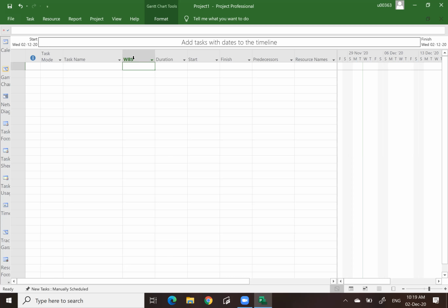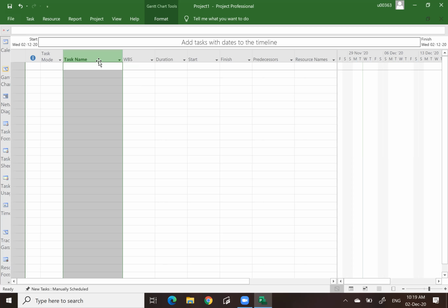See, the WBS we do not insert according to what we learn in class. We need to organize, because when you insert the task name, you put the list in the task name A, B, C, D, etc. So it is just a long list, and the computer does not know how to arrange it according to what the WBS structure looks like. We are the ones that should arrange.